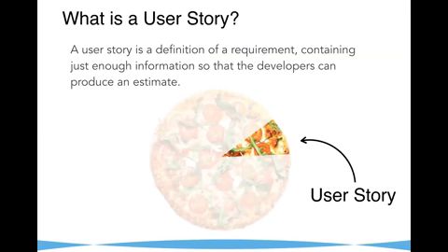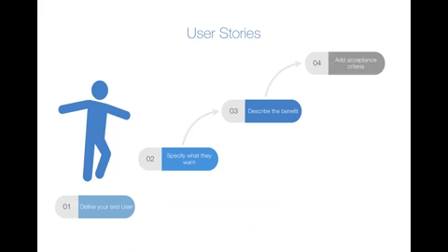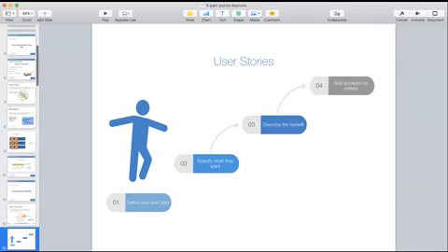So there's a misunderstanding a lot about the proper way to write user requirements. All right, so the first thing we should talk about, if you're new to Agile, is what is a user story? A user story is a definition, a requirement, a piece of functionality that you would like the development team to tackle. A more common approach is to think of user stories as problems that you would like your teams to solve, right? And there are usually 4 steps it takes to identify a user story.